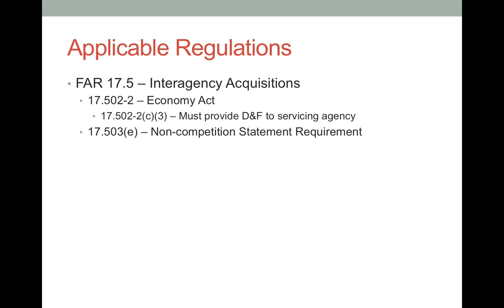Two points within this section that are commonly missed are the requirement to provide the Economy Act DNF to the servicing agency and to provide a non-competition statement when funding work at an FFRDC.